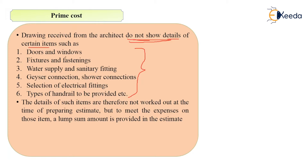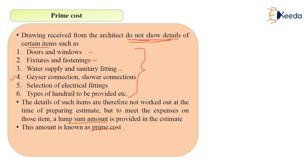Examples of Prime Cost items include: the type of doors and windows to be used — not mentioned in the architectural drawing; fixtures and fastenings to fix doors and windows; water supply and sanitary fittings with their specifications; whether to provide a geyser connection or not; and how many shower connections are to be provided. All these details are generally not shown on architectural drawings, so a lump sum amount is provided in the estimate — that is your Prime Cost.